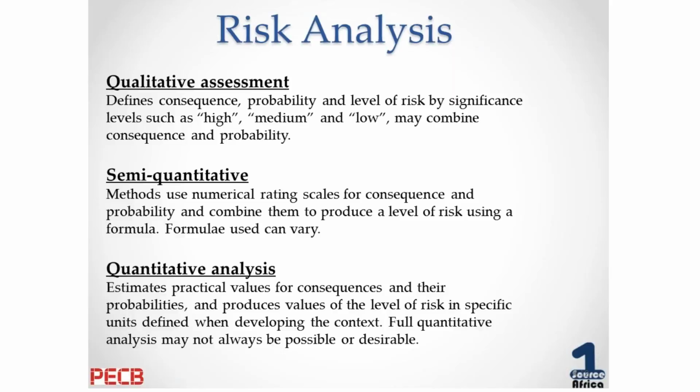Semi-quantitative is a method where we use numerical rating scales for consequences and probability and combine them to produce a level of risk using a formula. Here also control views can be taken into account, where a control is effective or adequate, or not effective or not adequate, and we can combine that to end up with a result.